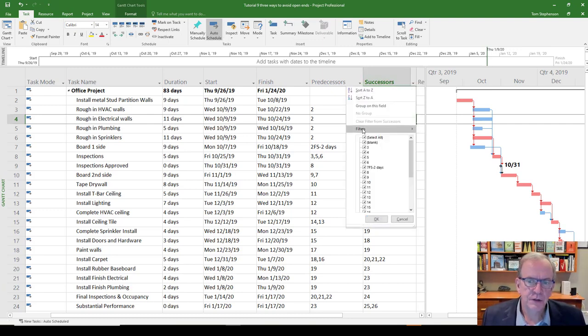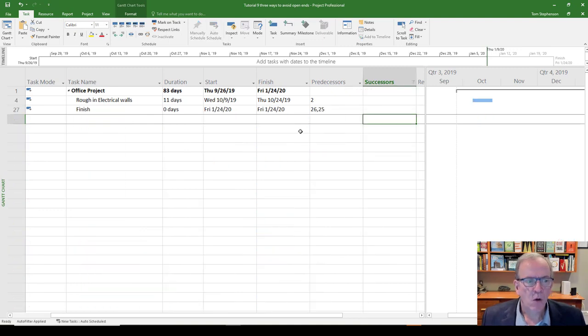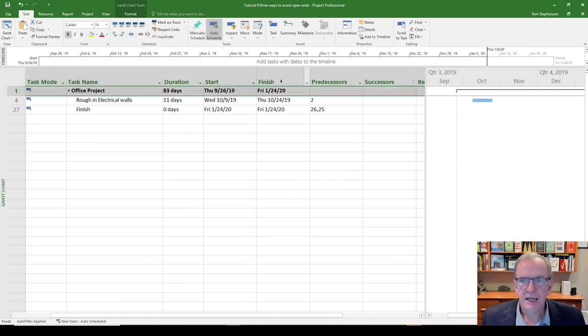You see where it says filters? Just below here, you can click on select all and make all the check marks go away. And then click blank. So now it's just going to bring up only the blank activities. So I'm going to click OK. And now all I see is 3. I see the heading, and I said that headings, the summary tasks, as Microsoft Project calls them, should not be linked to anything.